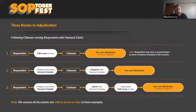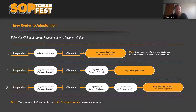The most usual pathway — particularly for those familiar with the process of adjudication and the security of payment legislation — is: someone serves a claim, the respondent disagrees and serves a payment schedule (which we called the most important document in the whole process last week), the claimant looks at the payment schedule and says 'I don't agree, I think I'm entitled to more than what they've assessed,' and then they go down the path of adjudication.